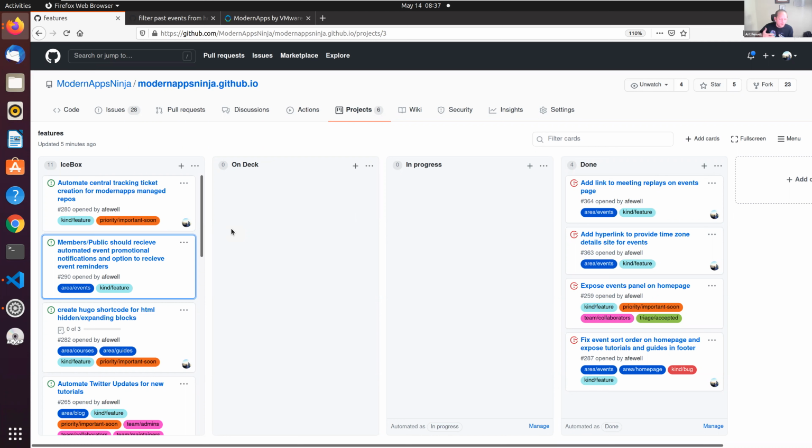So that way, if we need to go back and see what changes have happened to my content, I can very easily see here's the change that happened. Why did that change happen? I can see that's tied to this issue ticket that explains why the change happened. But that only works if we're using the issue ticket on the local repository with a pull request on the local repository. So what I have plans to do is, every time any issue ticket is opened anywhere,